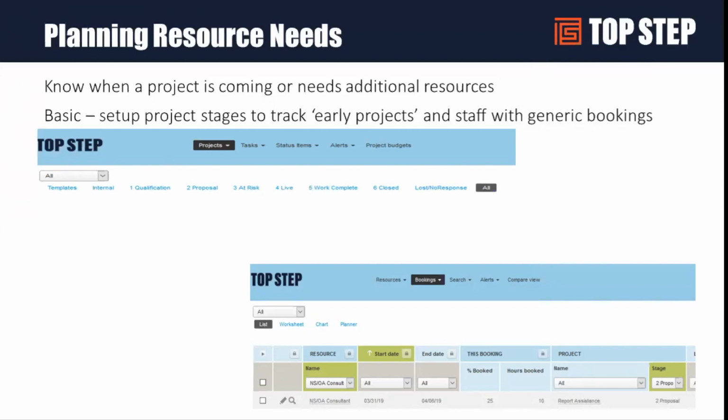And there's, of course, ways that you can use the filter sets in OpenAir so that you can prevent people from seeing those type of early scheduling activities, simply because it's part of the business to track forecasting, but it's not necessarily something you want to inform individuals on quite yet. Now, I call this basic because this is a project-centric scheduling model where things are coming in, they're not real projects, so I'm putting in sort of pipeline or forecast scheduling.